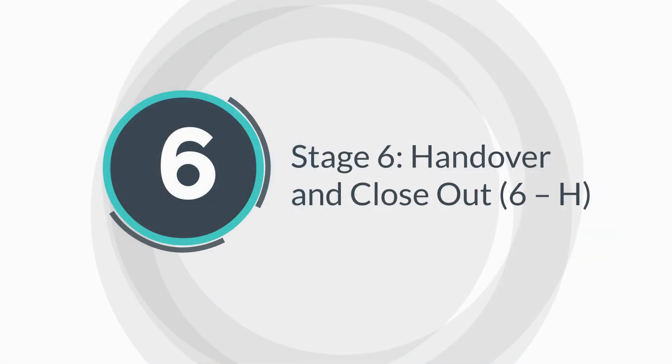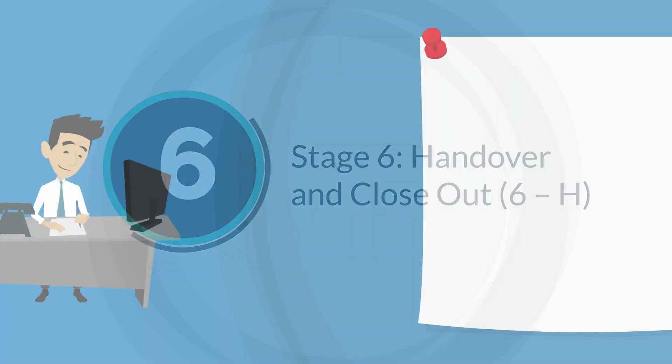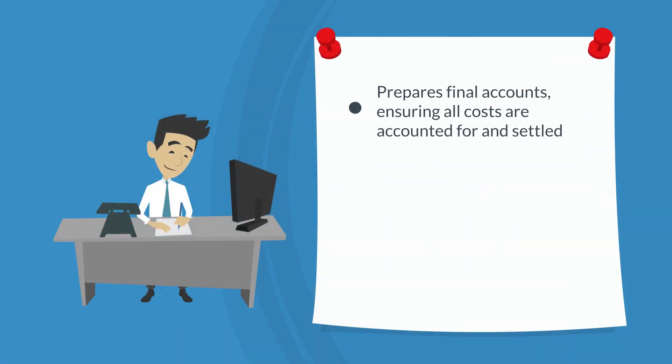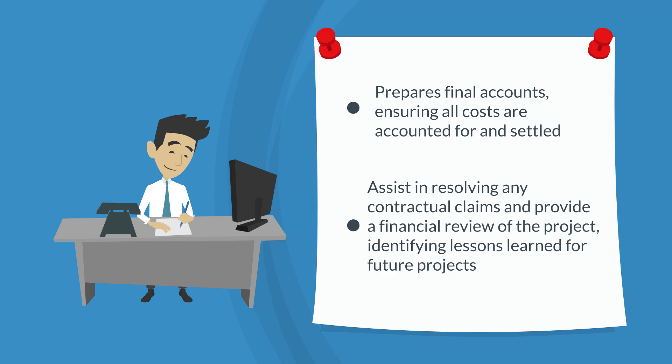Stage 6, Handover and Closeout. As the project reaches completion, the Quantity Surveyor prepares final accounts, ensuring all costs are accounted for and settled. They also assist in resolving any contractual claims and provide a financial review of the project, identifying lessons learned for future projects.